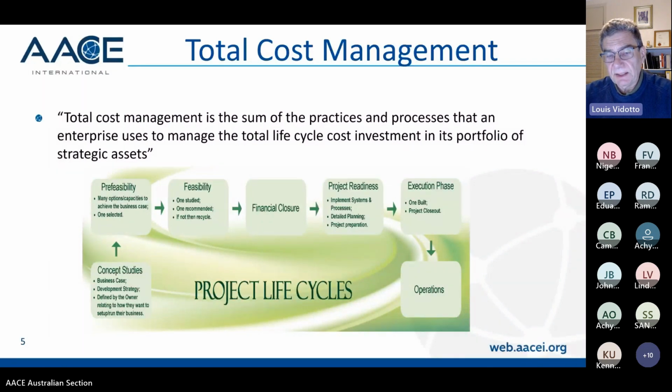Execution phase. The approval of the project will mandate what is to be built in terms of scope, schedule, estimate, contracting strategy, quality. So one of the things that the estimate contributes to, and we'll talk a bit more about that as we go along, is it is the fundamental document that becomes the budget. And the budget has to reflect how you're going to build the project and what you're going to build, etc. And we'll talk a bit more about that.